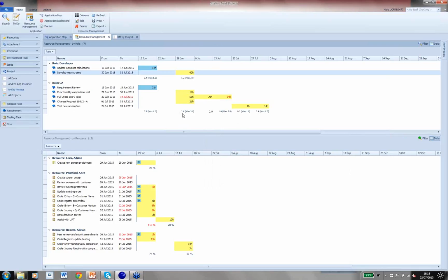So to look at another example, it could be that on average, I only need 2 people for the whole week. However, because some tasks start and finish on Friday, I actually need 5 people on that Friday. So in this example, you would see a 2 outside of the brackets and 5 inside to say on average it's 2 people, but there is a day at least when you need much more than that, and you have to ensure that you have that resource available.